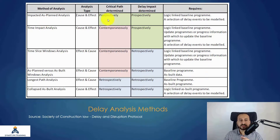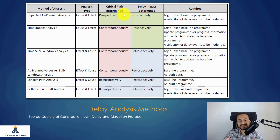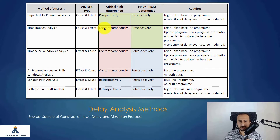There are prospective methods — on a given data date, whether a baseline or a schedule update, you are forecasting the impact of an event before the delay has actually happened. You forecast how it will look based on assumptions or a series of activities. For Time Impact Analysis, we use contemporary records — the schedule updates — which is what makes TIA stronger than other methods.